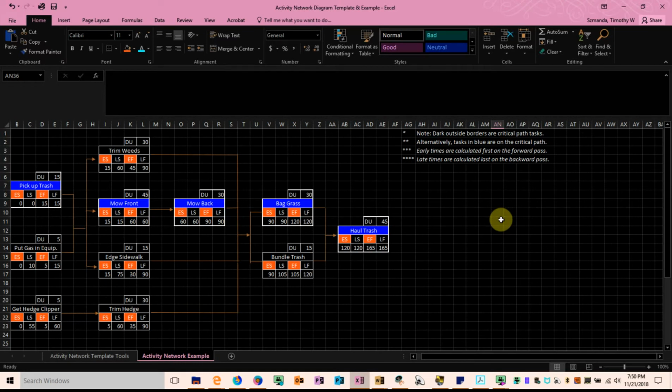In this video, we'll be following up on the previous video where we calculated the early start and early finish times. Now we're going to do a backward pass, starting at the end of our last activity of our project and then working back toward the beginning of the project. We want to determine the latest start and latest finish times. So we start at the very end and look at the latest finish.